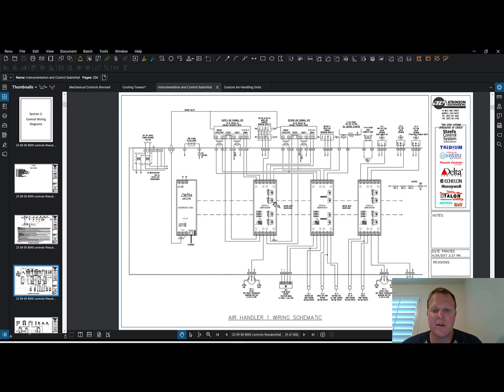Well, the structural steel fabricator goes and turns in, say you have a couple stories like this, I wouldn't be surprised at all to see a 300-page structural steel shop drawing showing all the different pieces, all the components, all the cuts, so that they can send that off to be fabricated and it's showing up to the site.